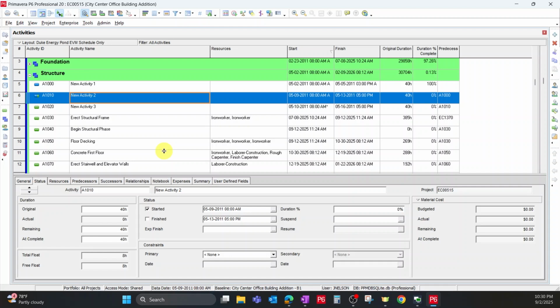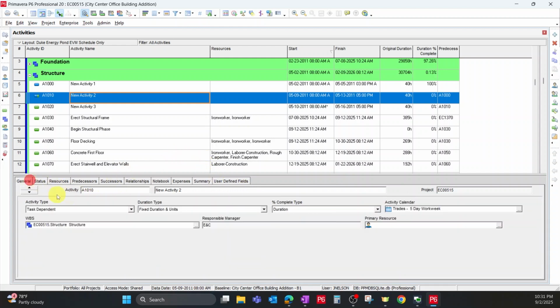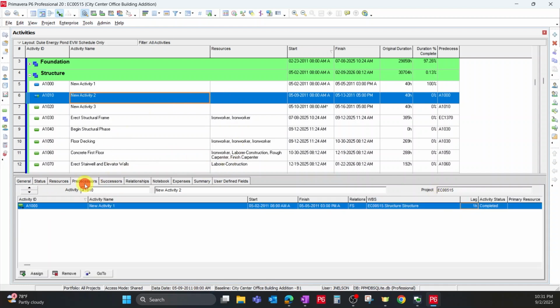There's different levels for every type of project. You may need a lot of tasks, you may only need a few. And Primavera is a powerful tool and it could do both. And always, troubleshoot your logic. Look at why is my task saying it's supposed to be on this day? Look at, systematically look at everything. Look at the activity type, the duration, the calendar, the logic. You can see that this is a driving task. It has that indicator on it too that you can add on these detail blocks.